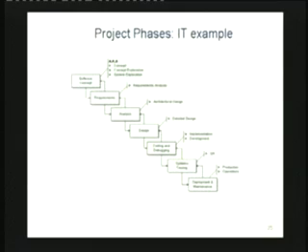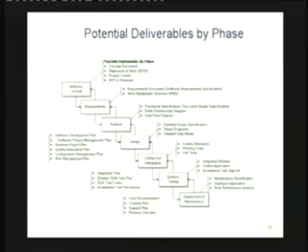If you look at the IT example, this is like that waterfall model. You've got the major steps there. When you start asking the question, what is there in box 1, what is there in box 2, and so on and so forth, you'll find details. You're well trained in this area. You'll say, oh my God, yes, these are something I'm familiar with. This is something that we normally do. This also spells out the technological sequence of things. The reason for you to get these details is not just bureaucracy. It also gives you the sequence in which things should be done, because the later things are dependent on the things that came before.